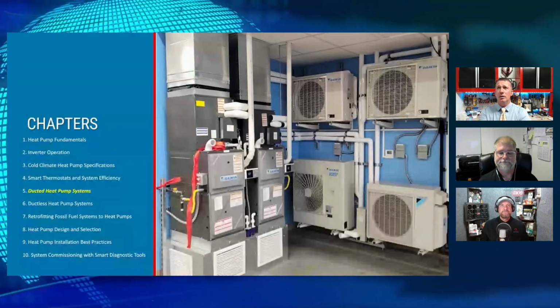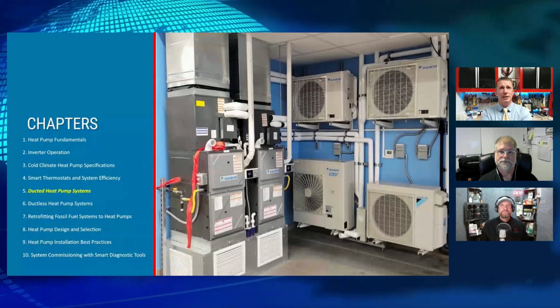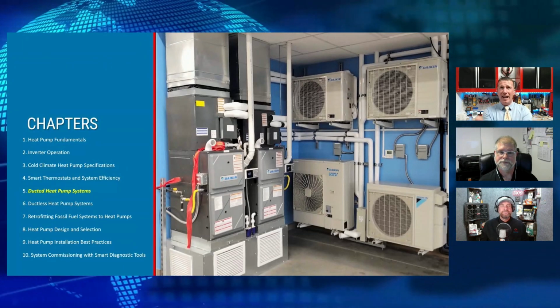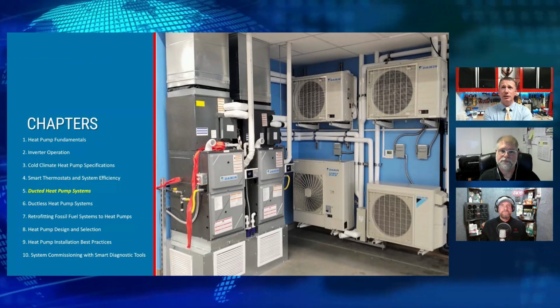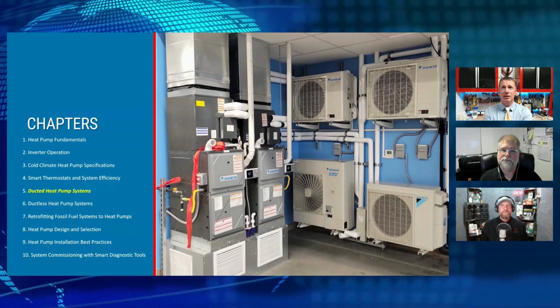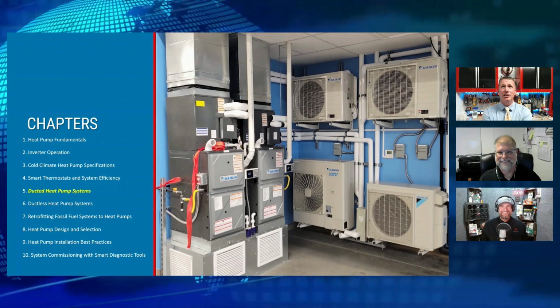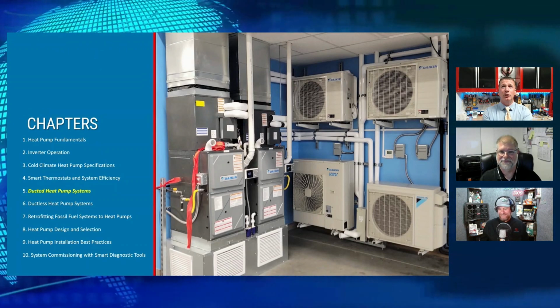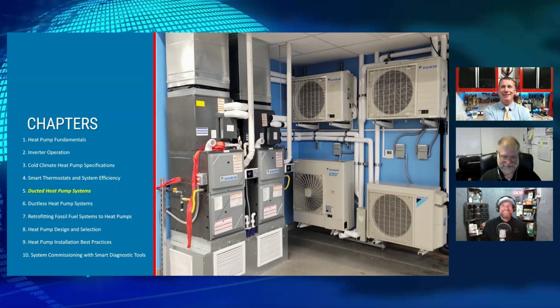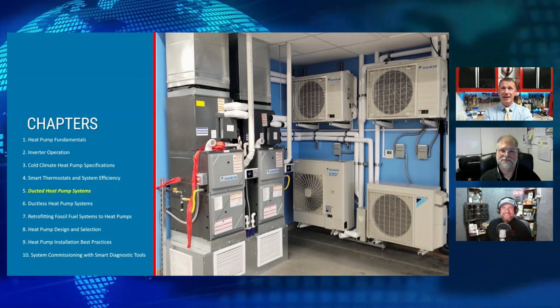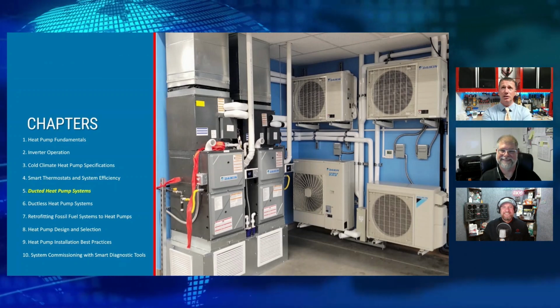No, absolutely. When we start talking about that whole commissioning and understanding, we're going to be doing a lot of education over this next year on proper installation and commissioning as well. We've actually always been required to do a commissioning report for our installation. I always tell people, if you don't believe me, go to the last page of your installation manual and you'll actually find what you should have been doing on the first page of the installation manual. So if you open up the last page, you'll typically see an unfilled out commissioning report.